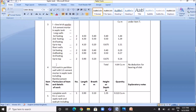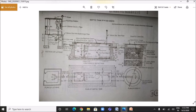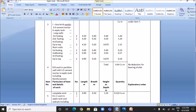The next item is reinforced brickwork in the partition wall with 1:3 cement mortar in the septic tank, including reinforcement. The partition wall has a length of 0.9 meters as clearly shown in the plan. The height is 1.2 meters plus 0.15 meters, equaling 1.35 meters. Its breadth is 10 centimeters. The quantity is 1 × 0.9 × 0.1 × 1.35, which equals 0.122 cubic meters.